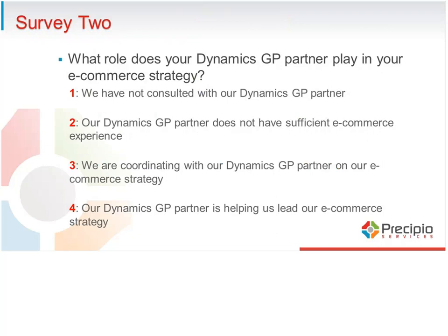Okay, so I asked the question just to keep something in mind. The other partner that I spoke with, his client did not consult with him or even tell him they were implementing e-commerce. They relied upon the claims of the web development firm saying they could integrate with GP. And only after the fact was he called and brought in to try to get the integration working. So it was very challenging, and it's much more expensive to have him come in after the fact and try to clean things up than if he were consulted during the design stage. Okay, great. So someone is consulting with their GP partner. Excellent.